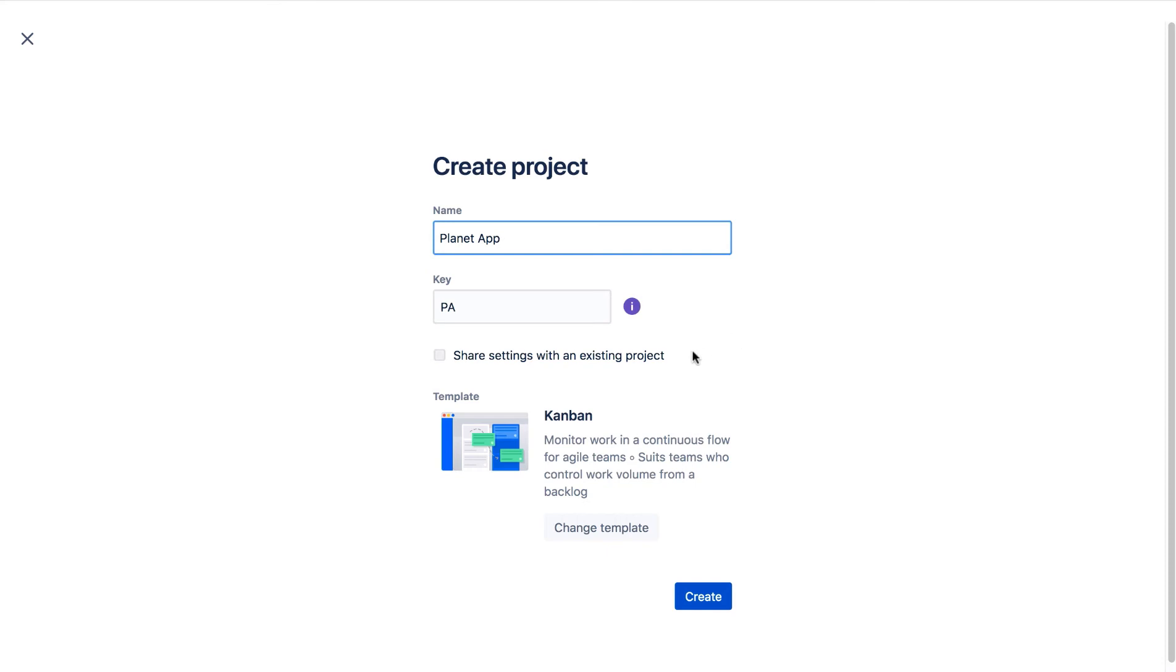Share Settings with an existing project lets you share project configurations such as issue types, workflow, screens, fields and more with other classic projects. If a change is made to one of the project's configurations, that change affects all the projects that share that configuration. We'll leave it unchecked and click Create.